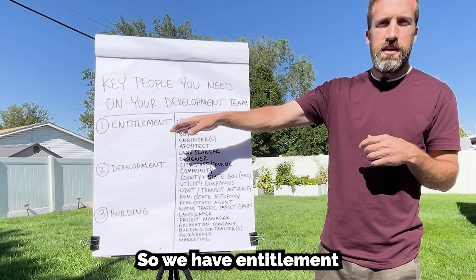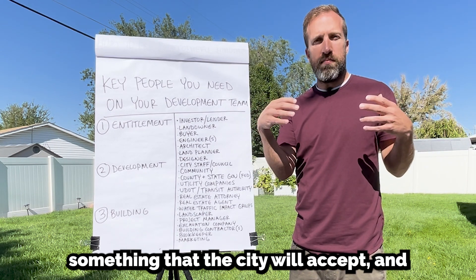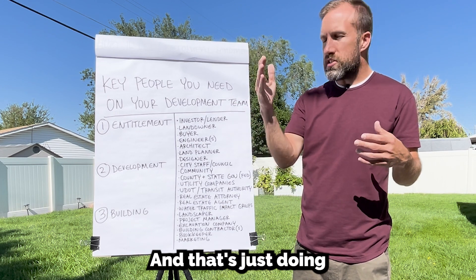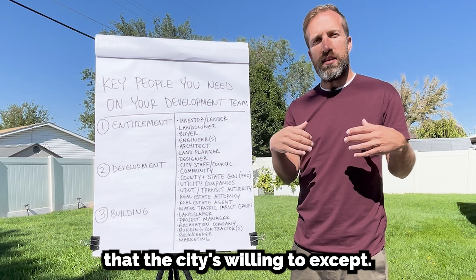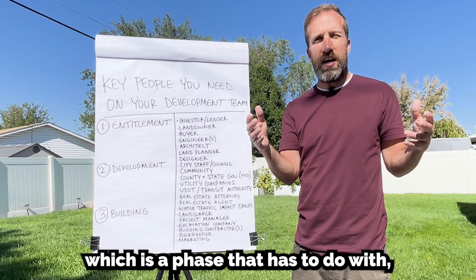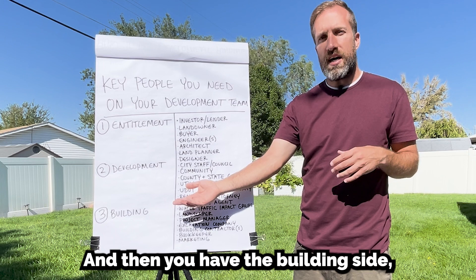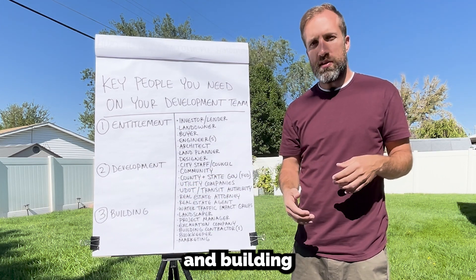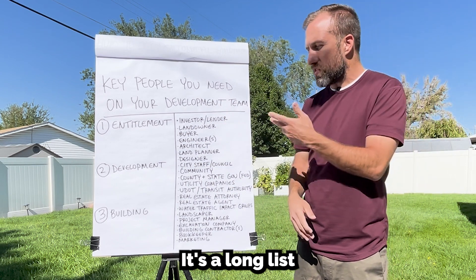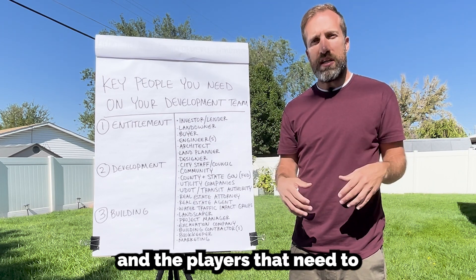We have entitlement, which is working to engineer something that the city will accept. You process that through the city in a process we call entitlements — just doing the paperwork necessary to have something the city is willing to accept. Then you have the development period, which deals with utilities, roads, and dirt work. Then you have the building side, which we call vertical — actually building the buildings. Here are some of the players; it's a long list that pretty much sums up a majority of development.